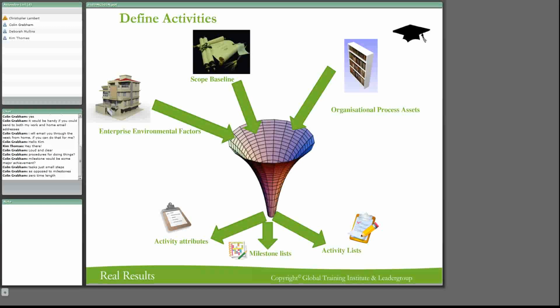Zero time left. Yes, there is nothing that's going on in a milestone. A milestone has zero time length. A milestone is something that we get to and we say, hey, we've achieved this. So there's no work. There's no work. Yeah, thanks. You're right, Colin. There is no work in this. Right, so a milestone and the list of the milestones are those breaks that actually show us that we've achieved something, but it has no work attached to it. Right, so we must see it from that perspective.